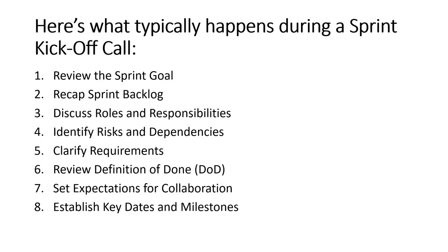And the fifth step is clarifying requirements. Basically, if there are any questions from the team regarding the user story, we make sure that we take notes on their questions and address them, and if they're looking for any additional details or refinement of the user story, make sure that you, as a business analyst, fill those gaps and take the notes from the team. And then you review the definition of done.